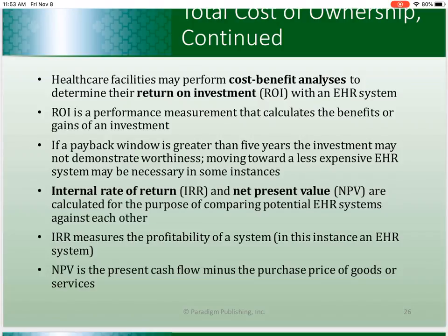So your net present value measures the excess or shortfall of cash flows once your financial obligations have been met. So if the IRR, internal rate of return, or NPV, net present value, for an EHR system is greater than the IRR or an NPV of other EHR systems, then the EHR is considered a good investment.